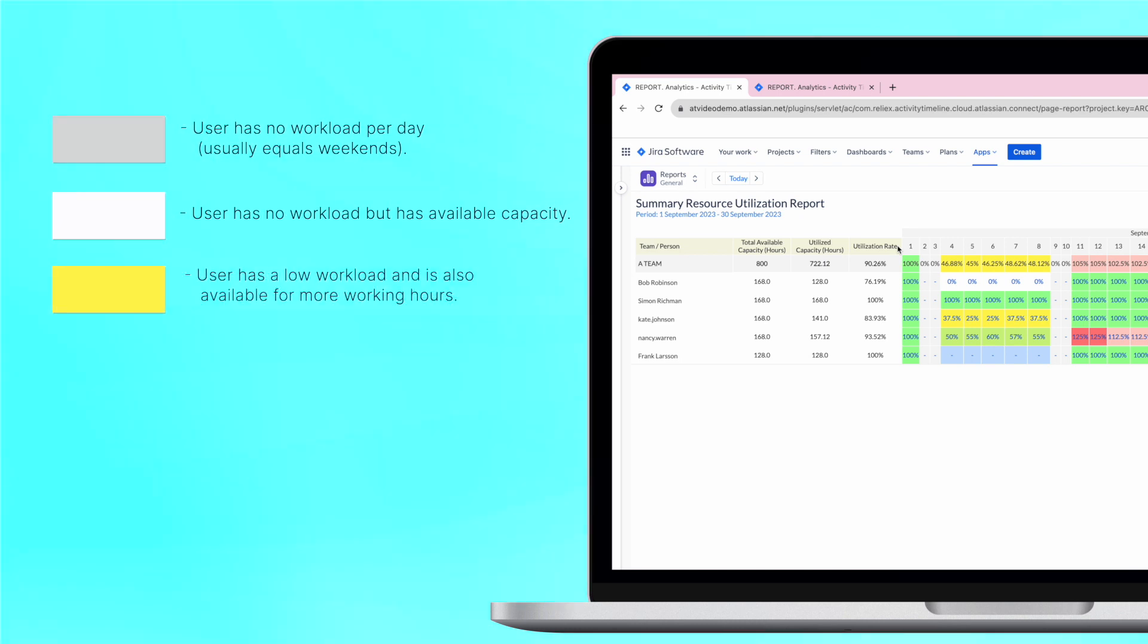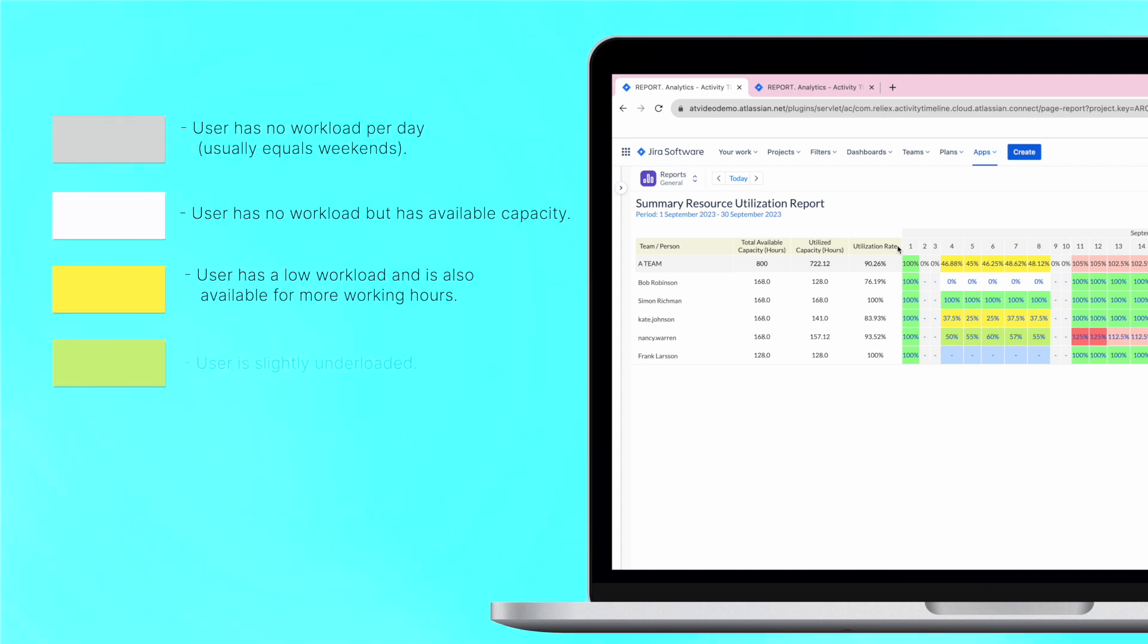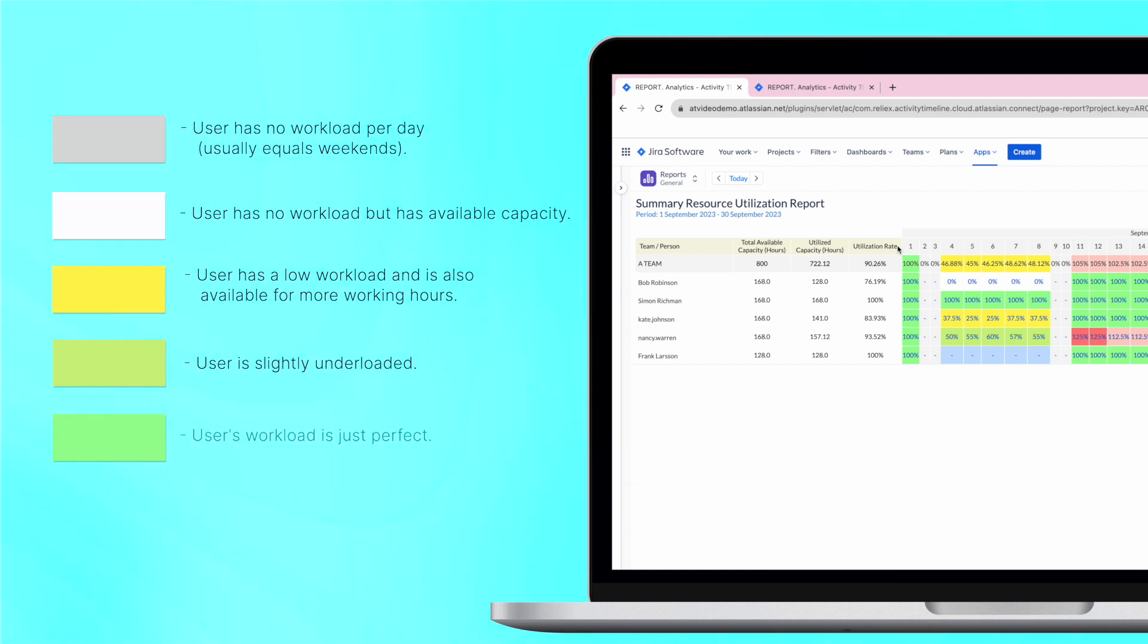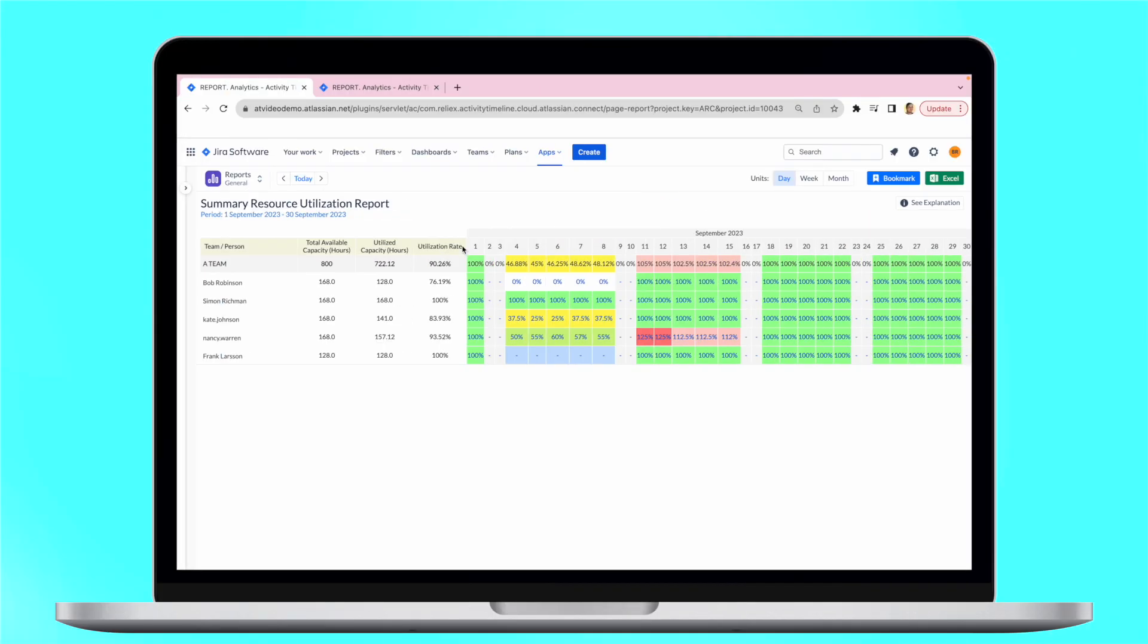The yellow color means that the person has low workload and is also available for more working hours. A slight green shows us that the person is slightly underloaded, and green cells that the workload is just perfect. The red color shows that the user is overloaded.